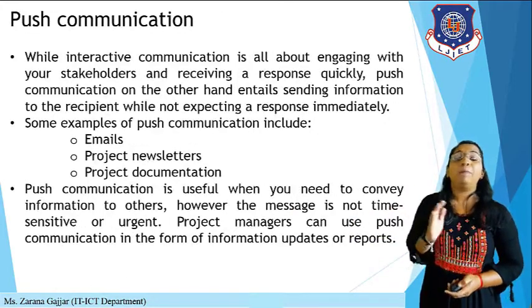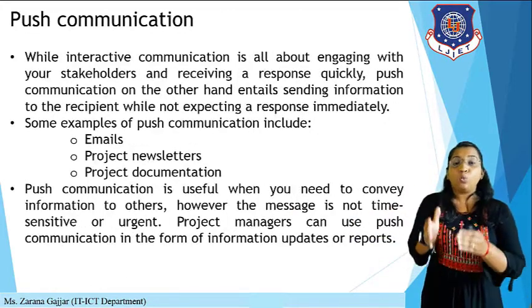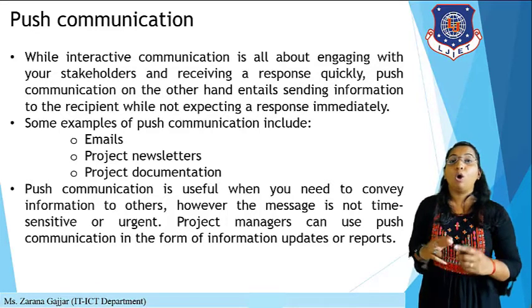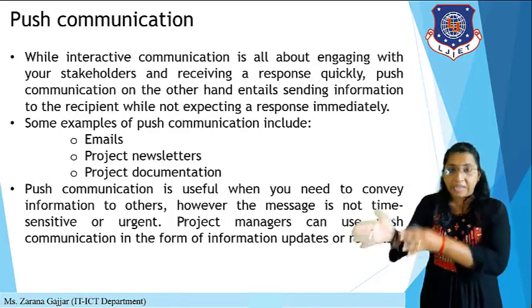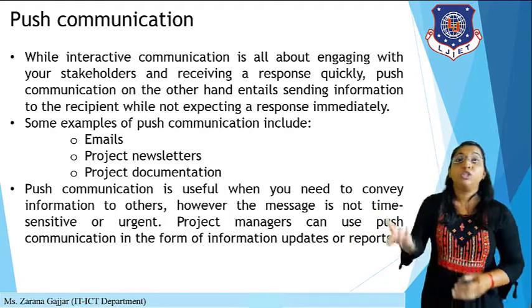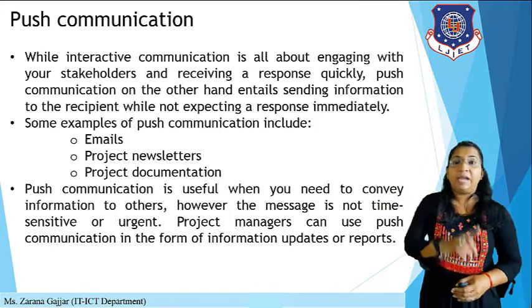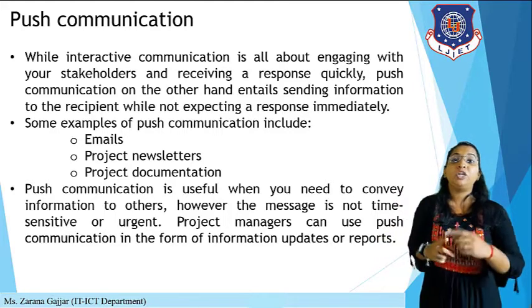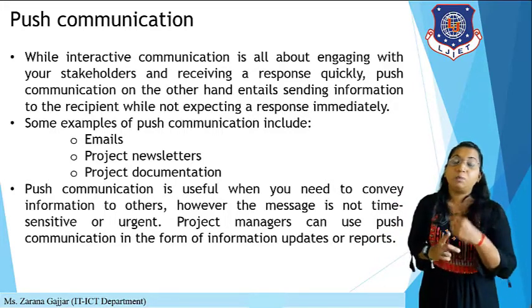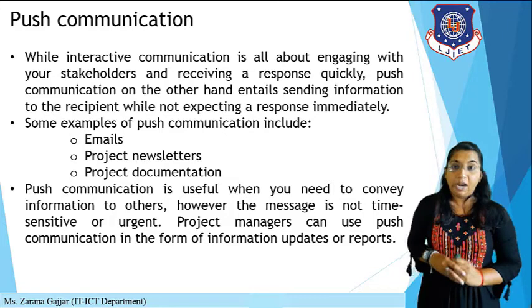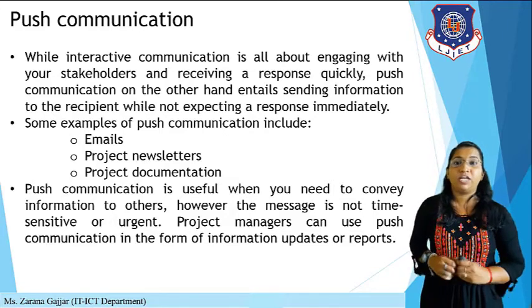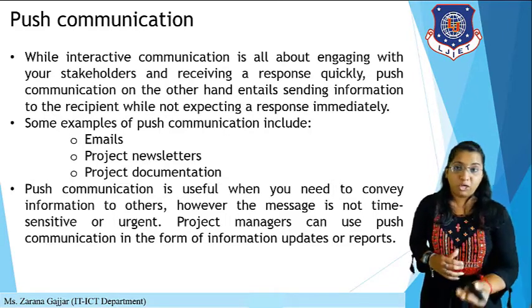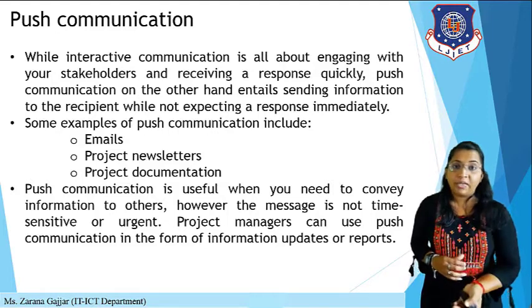Now what do we mean by push communication? While interactive communication is all about engaging with your stakeholders and receiving a response quickly, push communication, on the other hand, entails sending information to the recipient while not expecting an immediate response. Some examples of push communication are emails, project newsletters, and project documentation.